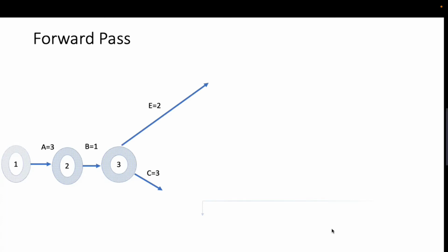So when I draw this activity E like this, it implies that E follows B, or sometimes even A. So after B is completed, only E can be taken. After B is completed, only C can be taken. But there is no dependency between C and E. So you just sequentially number the nodes. So there's not much of a significance. So now we got E.